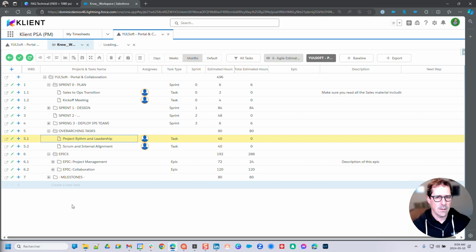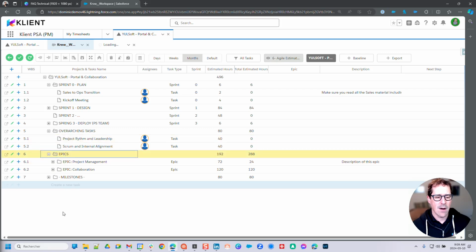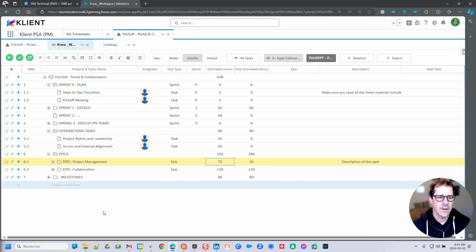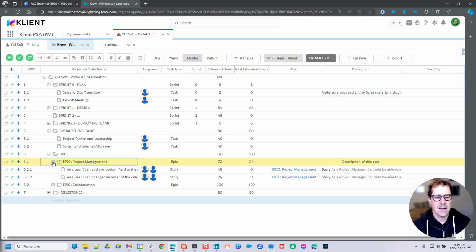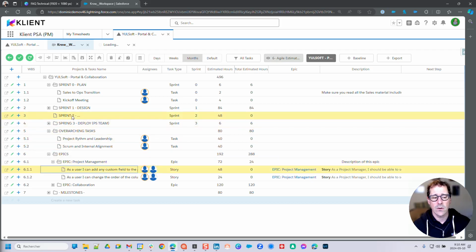Back to our main topic here, the epics and how we can relate the stories. As you're building your project, you'd build your epics, maybe having a rough sketch or a rough estimate of the effort required for each of those epics. As you're detailing further, you'll create your stories. And as we're going to eventually use those stories in sprints, the request was to keep and maintain that relationship, a meta relationship between the stories and my epics.